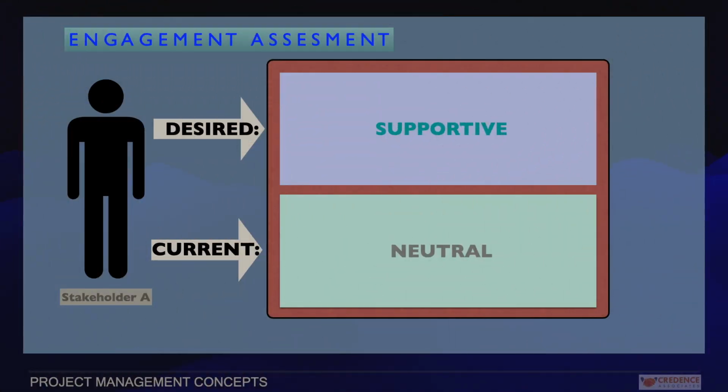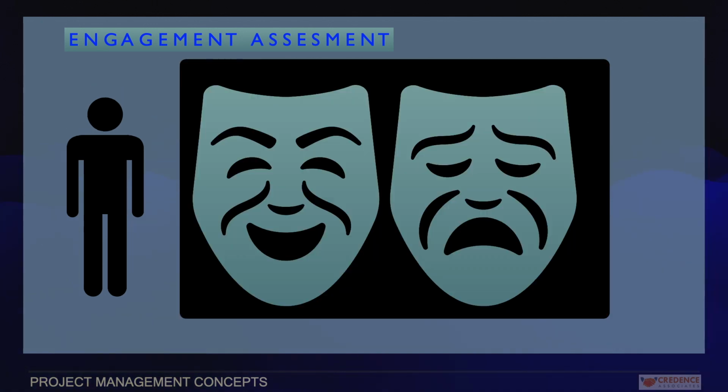The Stakeholder Engagement Assessment Matrix is an important tool for engagement. The effectiveness of stakeholder engagement needs to be analyzed. As the stakeholders come in and go out, and their impact on the project may vary from time to time, it should be tracked efficiently. Stakeholder satisfaction can be measured through questionnaires, surveys, Net Promoter Score, mood charts, one-to-one meetings, general